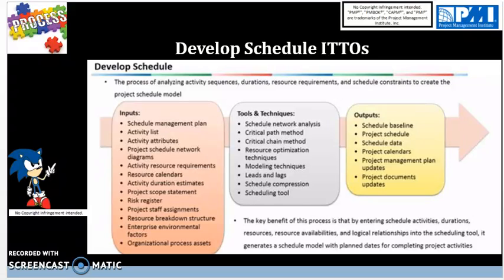Typically, this is a wrong answer choice on the PMP exam. But just keep in mind, at any time you hear the word buffers on a schedule path to account for limited resources and project uncertainties, this is basically taking the critical path method and adding those buffers. That's what critical chain method is.